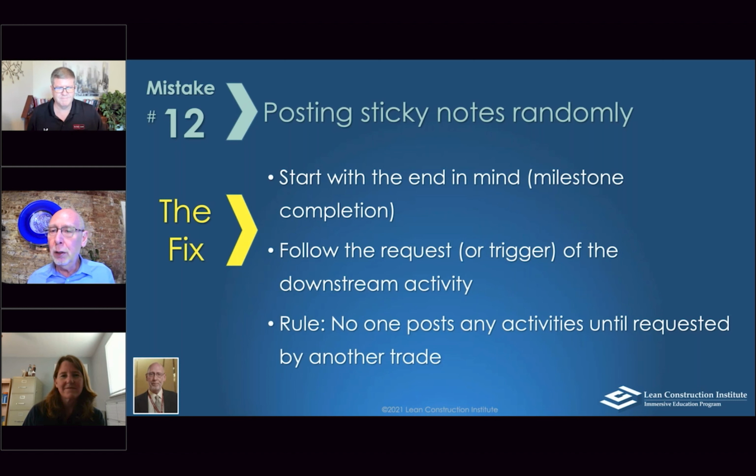I may sound paradoxical, but the whole point of the sticky notes is to drive the person at the transition points between one series of tasks and another series of tasks. It drives the two people responsible for the handoff, like in a relay race, together so that they can coordinate the handoff. Because it turns out that how handoffs are translated from one working group to another, same thing as Toyota assembling at one station to another station, becomes critical. Handoffs are critical.